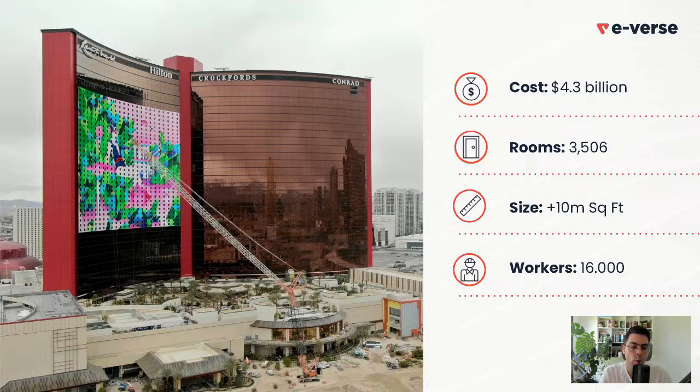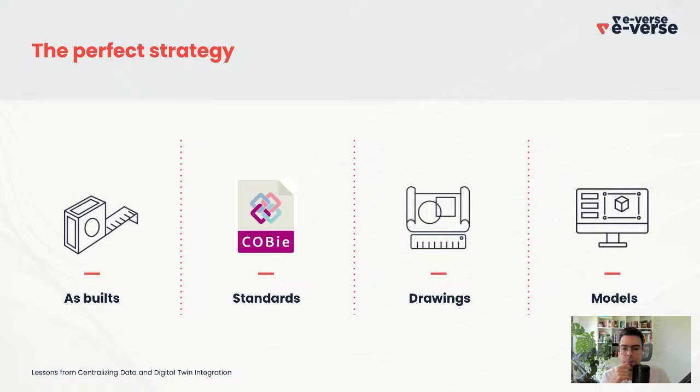We were excited because we were going to do the FM process of taking all the data from pre-design to design to construction, and then hand it over really well done to the facility manager. And we were excited. I worked on this a really long time. The idea was to gather all the as-builts, everything to the detail. I remember that we were even updating the BIM models because there were changes in the field that were not following the BIM models as the construction was in a rush. Like many times happens. It's a bad practice, but it did happen.